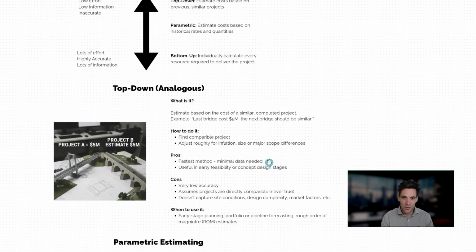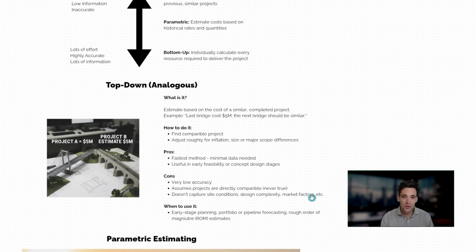Again, it's the fastest method. It's minimal data required. We don't even really need to understand the project we're pricing in that much detail. So it's only used in early stage feasibility or concept design. While it's low effort, it's obviously very low accuracy because it assumes projects are directly comparable, which is never true. No 2 projects are ever the same. That's the definition of a project.